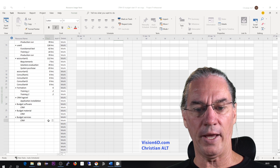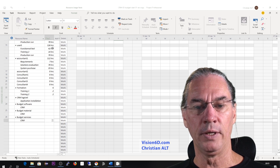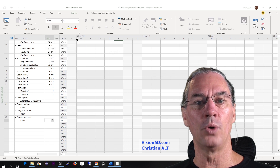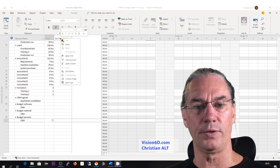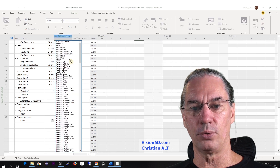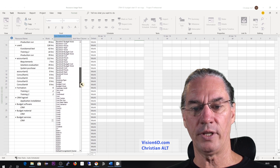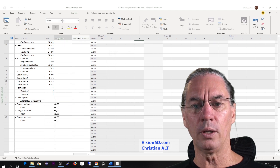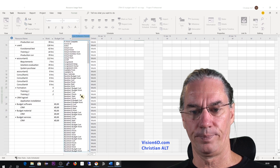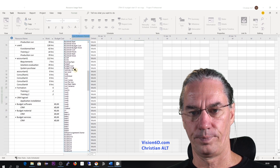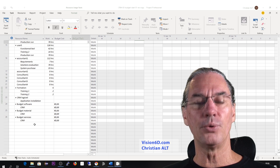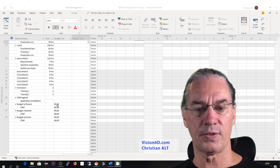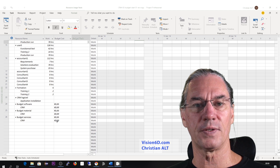If you try to enter anything here, it won't be possible because we have the work column. So in this view, we are also going to add our budget columns. I go into insert and go down to budget, and I will first insert budget cost, and then also add the column budget work. You see the transformation — since our budget resources are of type cost, the cost column appeared.